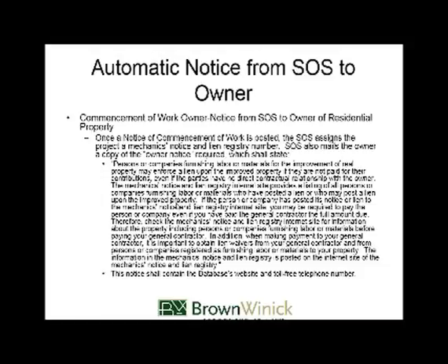When does the owner notice have to be given? The first owner notice, that needs to be given, that's the first notice, not the second one. That needs to be given prior to starting work. So there's no set time period on exactly when. Again, our preference is that you give it at the same time as you are signing your contract with the owner. That way you have it in writing, it's clear to everybody that it's out there.